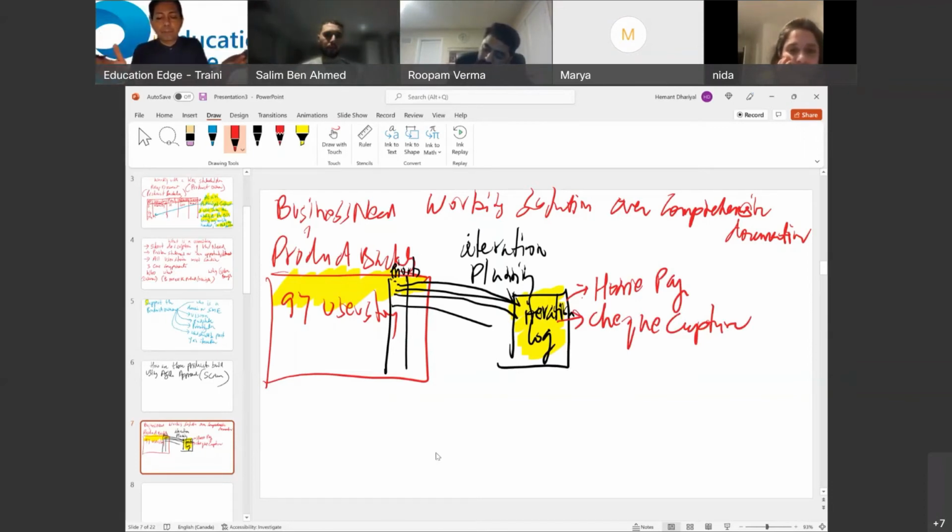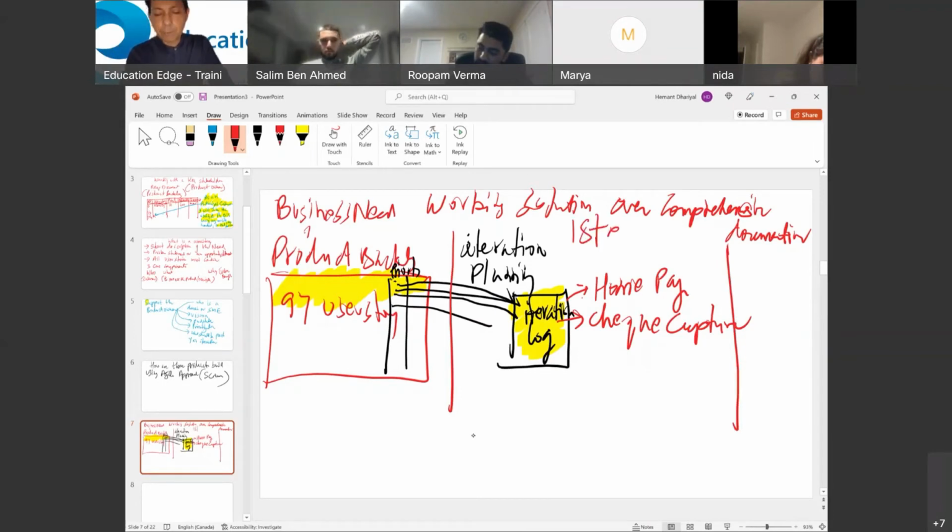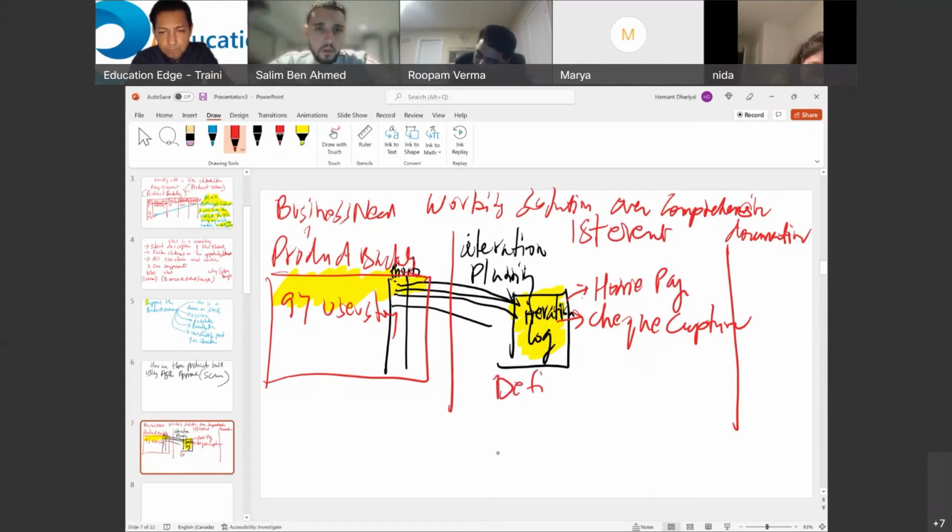And if I ask you a question, why did the team pick up these two user stories? Your answer will be because product owner wanted these user stories to be delivered in the next iteration. These user stories will generate maximum value. Build the product using user stories that generate maximum value. So homepage, check capture, but iteration planning, the first event called iteration planning, is not just about creating an iteration log. It is also about working with the product owner and creating or developing something called definition of done